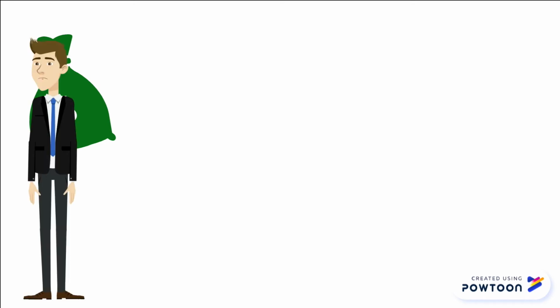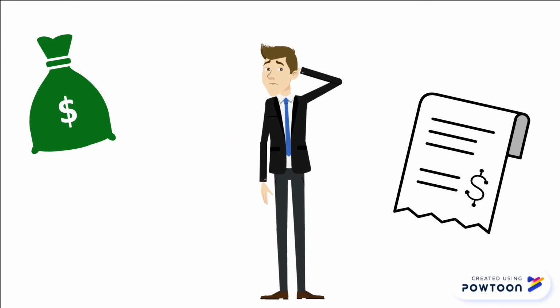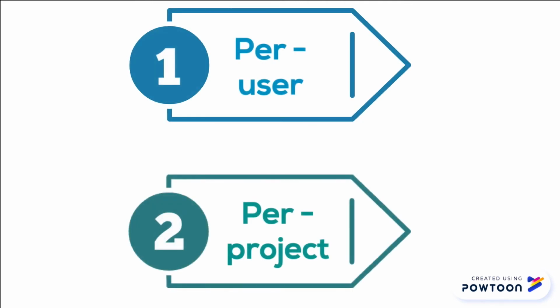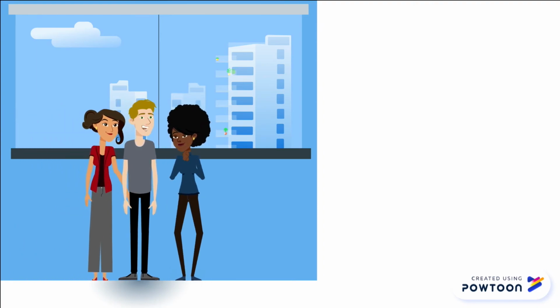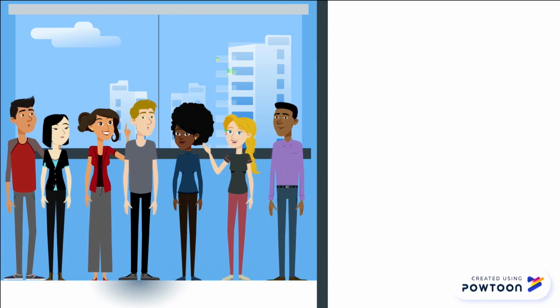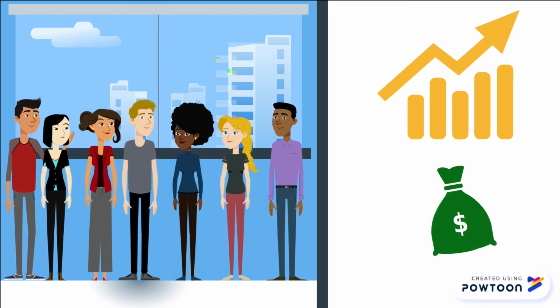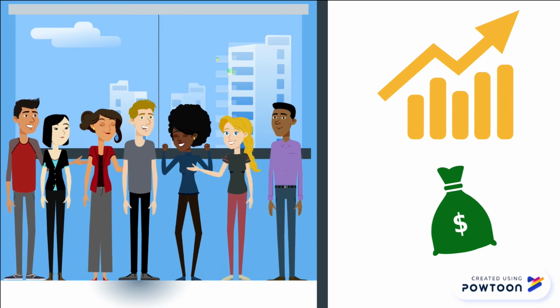In addition, the cost of certain project management tools can be prohibitive, and sometimes there is resistance by those in charge of the budget to spend money on tools when cheap or free alternatives may be available. Many project management tools operate on a per user or per project basis. So, as your team grows or the number of projects your team works on grows, a ceiling is reached. When the ceiling is reached, you have to go to the next subscription level within the tool, but you might not have the budget to do that. So be careful when planning out your tools and make sure that what you have is scalable without necessarily incurring heavy extra costs.